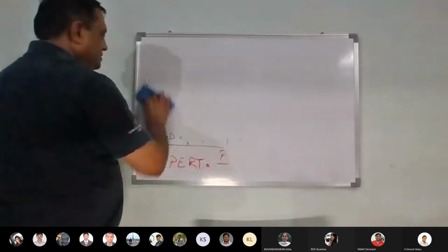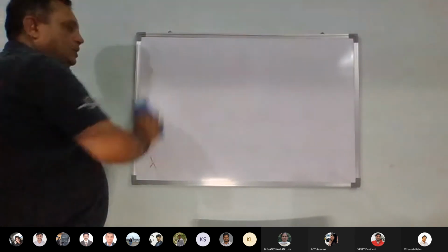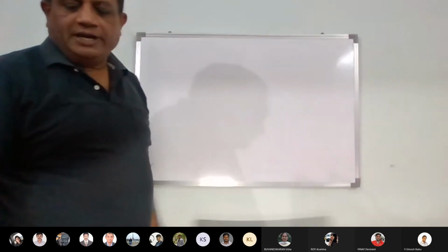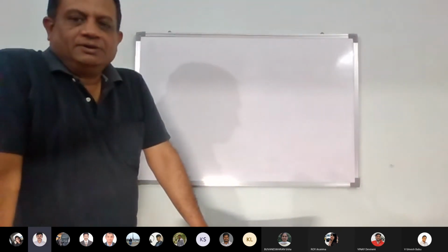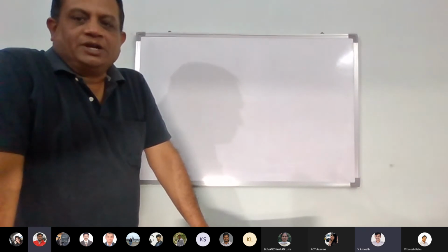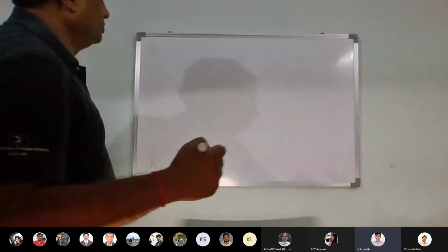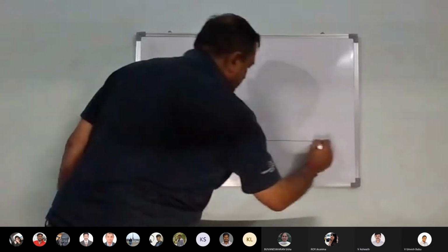You see, what happens is in class 4 or 5, we were taught that if one man builds a wall in 10 days, how many days will 10 men take to build the same wall? You remember? So what was your answer? One day. But in real life, that is not true. In real life, that is not true because of the law of diminishing returns.